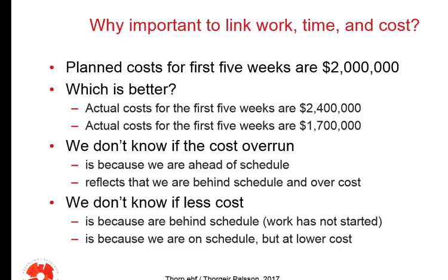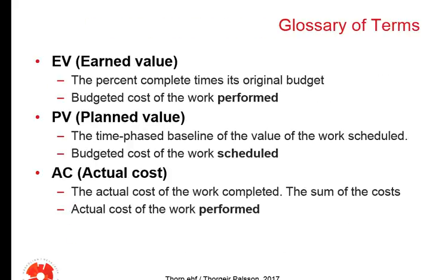The best way to see exactly where and how the project is developing in terms of time is the Gantt chart, the tracking Gantt chart. That is something you need to keep in mind. There are other things that we can use to tell us approximately how the project is developing, but if you want to know exactly, or at least with as much accuracy as possible, you have to use the tracking Gantt chart to see, as we just saw, where exactly we are in terms of implementing the different activities.